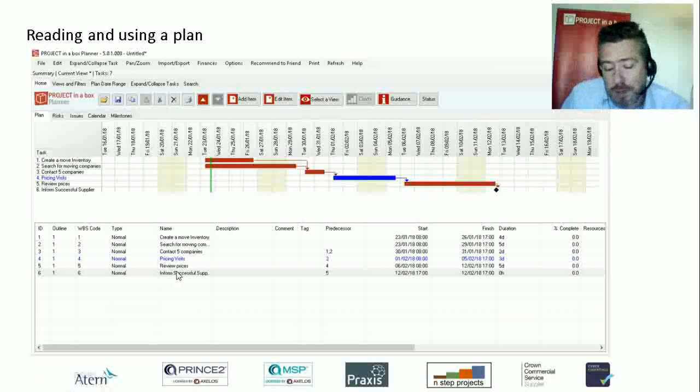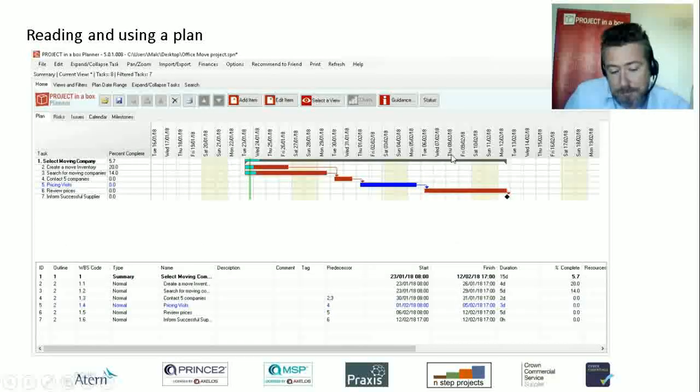So actually we can also then group these tasks together, and here they're shown banded by this black band. A grouping task does not set its own start and end date. That's set by the content sat within it.